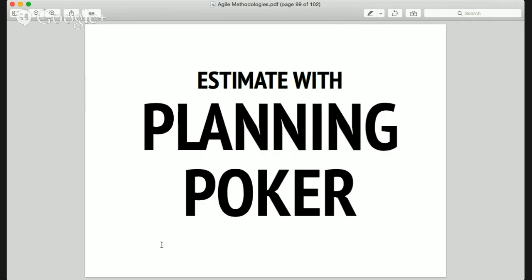The first engineer out of 12 people says, I think it's going to take 5 story points. Then everyone's going to think, oh, okay, I guess it's going to be 5 story points then, right? So the point about doing this type of planning meeting is that we have all of the engineers on board give their estimates simultaneously, in this game called planning poker.